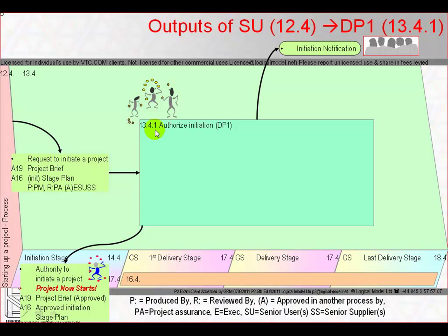The decision may be made in a formal meeting or in an informal manner, but is an official decision requiring participation of all board members and must produce some, quote, documented instruction to be given by the executive to the project manager.